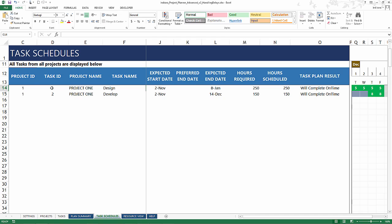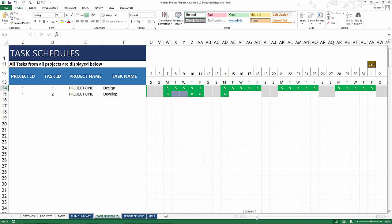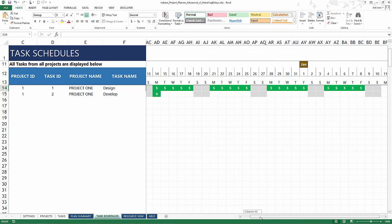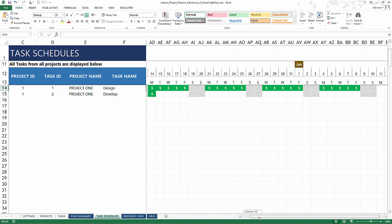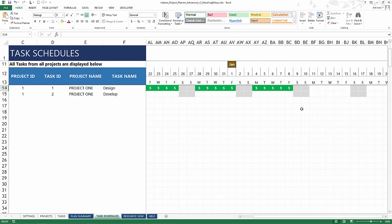Task 1 is projected to end on 8th January and Task 2 is projected to end on 14th December. So clearly Task 1 is where we need to focus to see how we can improve the chances of that completing earlier. The Gantt chart displays the same thing. Task 2 will finish on the 14th. Task 1 continues all the way until January 8th.